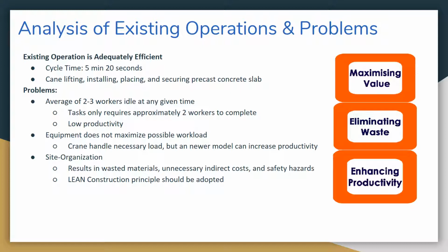When analyzing the existing operation through crew balances, flow diagrams, and process charts, it appears to be an adequately efficient system with a consistent cycle time. The process of lifting, installing, placing, and securing a precast concrete slab averaged a cycle time of 5 minutes 20 seconds. However, based on the original crew balance, it is apparent that many workers were frequently idle.